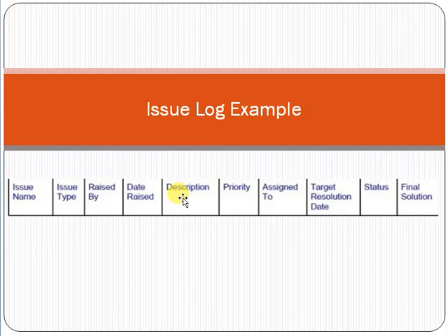For example, you don't have the software development resource available from 5th July to 10th July, and at that date these task activities are on the critical path, and if the resource is not available, the project will be delayed. This is an issue. Or the production deployment resources may not be available after 2 weeks, and you have to do the deployment after 2 weeks. So what will you do in that scenario? I'm just giving you an example.